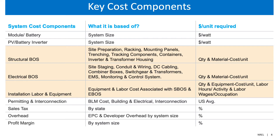These are our key cost components or categories broken down from our total system cost. The first two cost components are commodity components, and the highlighted cost components are where we have done detailed modeling by analyzing all the different sub-components, activities, and labor effort required — things like site preparation, racking, and wiring activities. We also take into account how the cost and quantity of these sub-components change as we introduce economies of scale and for different system designs.